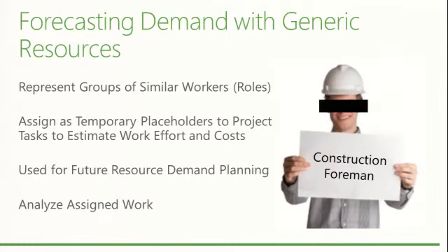When we ultimately end up generating these charts, to represent the future planned work, or the demand, on your resources, we're going to look at how much work is assigned to these different types of generic resources.